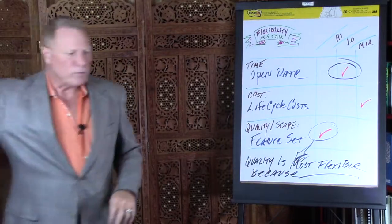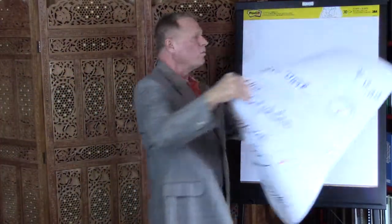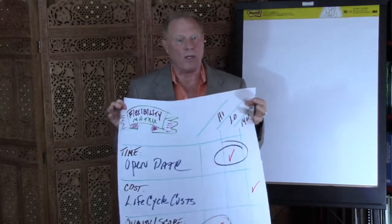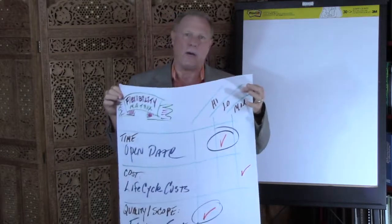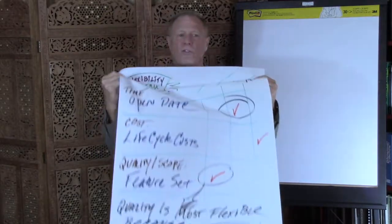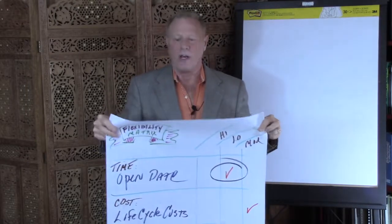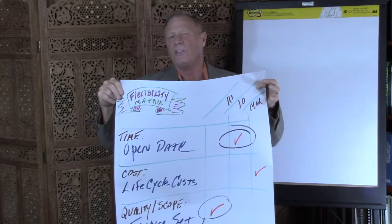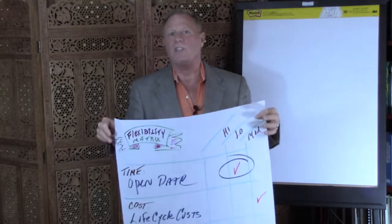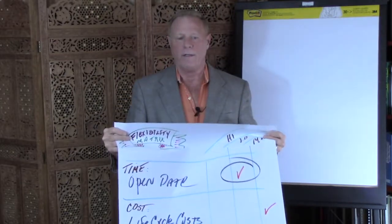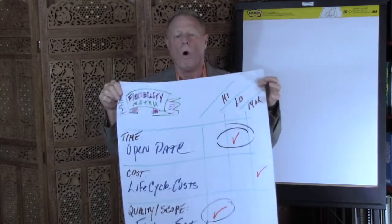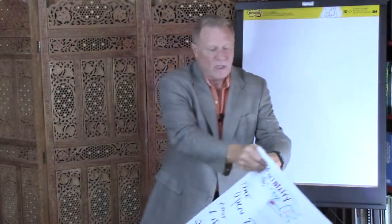Now, what do you do with this? It becomes what we call wallpaper for the project charter. From this point forward, all of our decision making should be consistent with this. If somebody has the idea that we could save a lot of money and not delay the opening date by more than 30 or 60 days, they'll probably lose that argument because we don't have much flexibility when it comes to having people sitting around being idle. We should give this to our executive sponsor or product owner. Knowing in advance they would rather talk about it for 30 minutes than take three minutes and put something in black and white, we're smart enough to anticipate that. We will build it ourselves, but hand it to them — they love to edit. Say, here's the flexibility matrix we built, and if you don't like it, change it. We'll go back and make our decisions consistent with it. This wallpaper helps guide consensus and make it much easier to build consistent decisions.